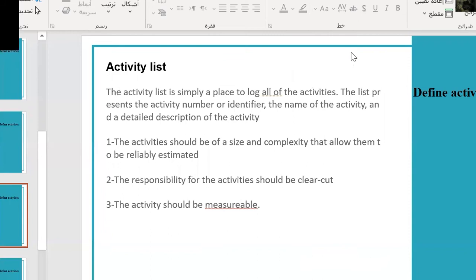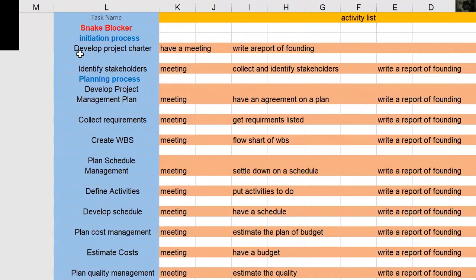The activity list is a place to log all activities. It includes the activity number or identifier, the name of the activity, and a detailed description. There are three requirements: activities should be of a size and complexity that allows them to be relatively estimated; responsibility for activities should be clearly assigned; and activities should be measurable.